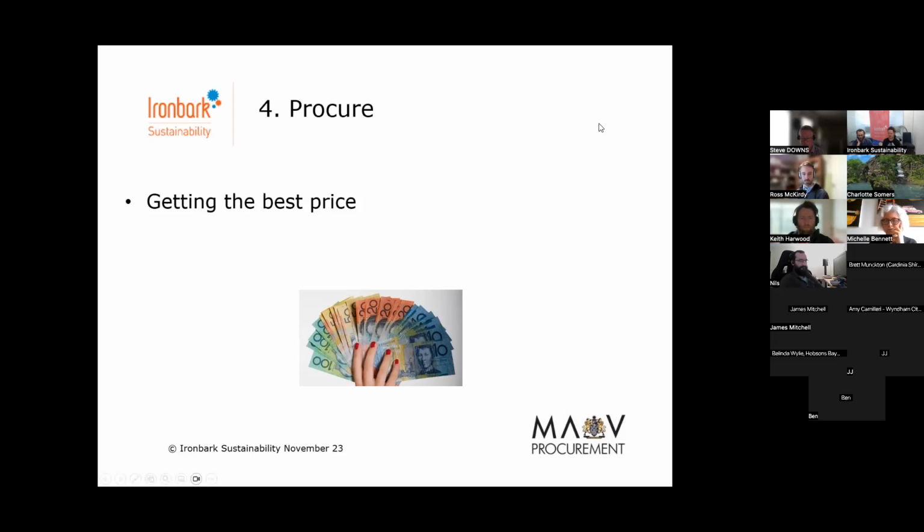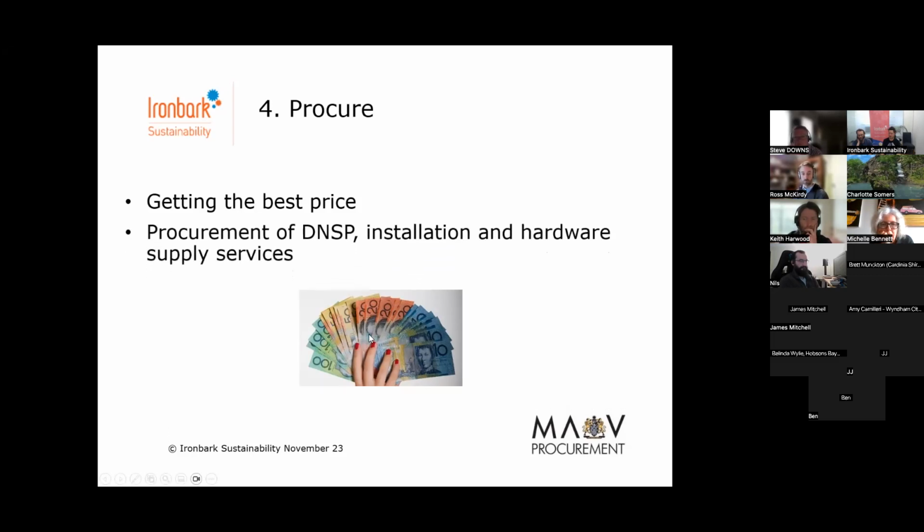Depending on which DNSP area you are in, your DNSP will either allow you to procure hardware, installation services and project management services, or they will only allow you to procure hardware, and they will project manage the install and procure the installation services themselves. So a lot of you, if you've done a past project, will know the situation you're in with your DNSP. Of course, if you don't use the MAV panel for procurement, that's fine. You don't have to, but as Steve was saying, it's intended to save you work and a lot of time, as you'd have to run your own procurement process.